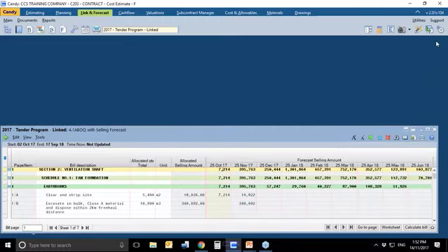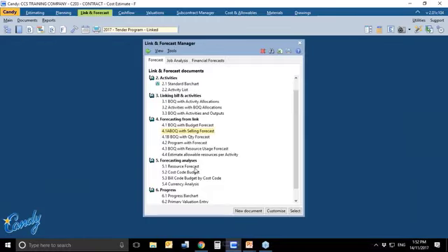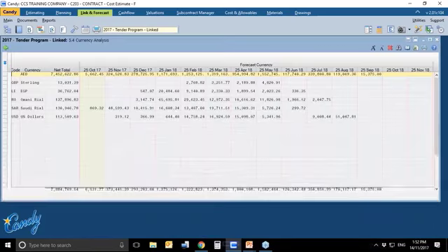Now, how does it help with the currency codes? Are we veering off topic? Let's go to the blue book, and if you look at the currency analysis document, this report here will give you the foreign currency requirement over the duration of the contract. It tells you we need 130,000 worth of Saudi Riyal for this project, and which month would I need it?